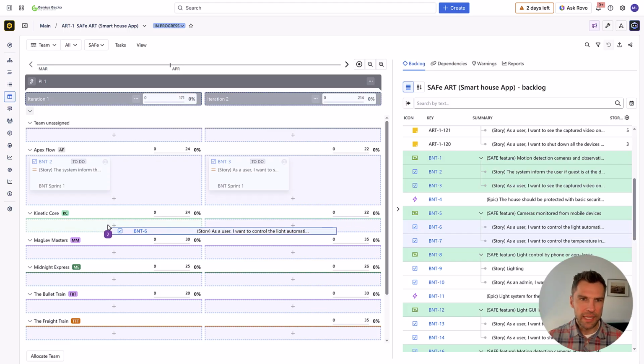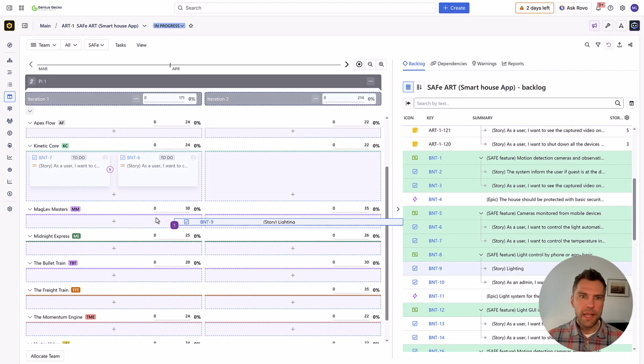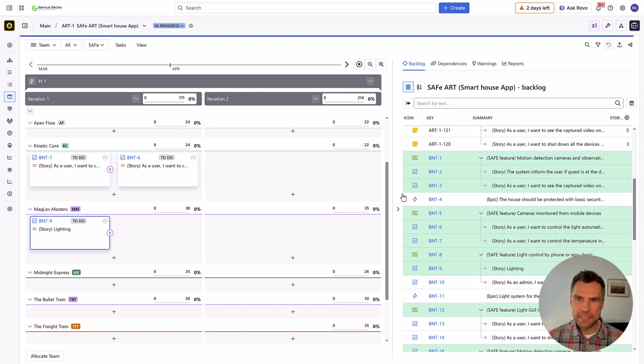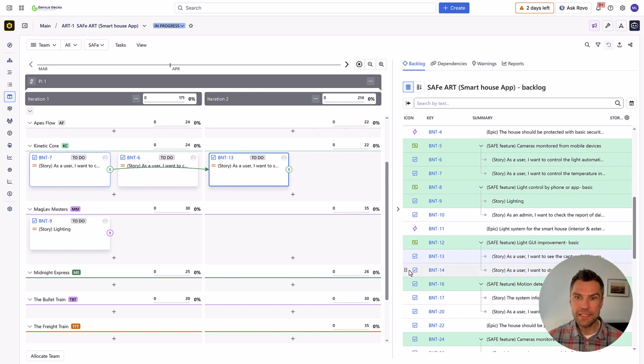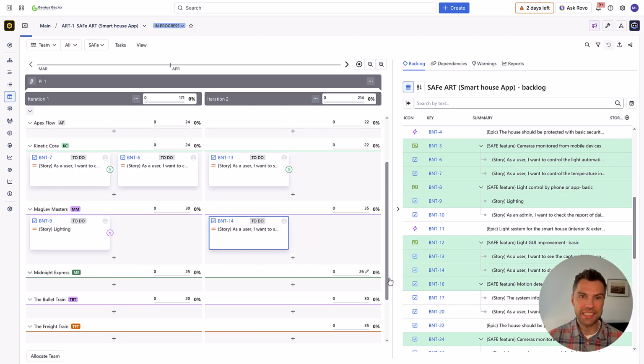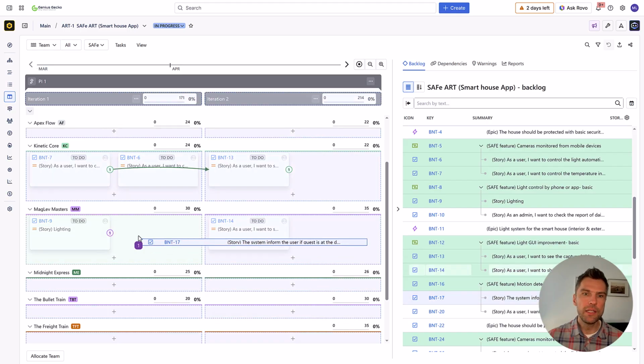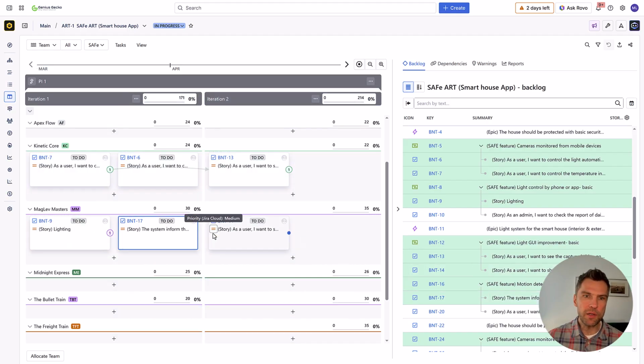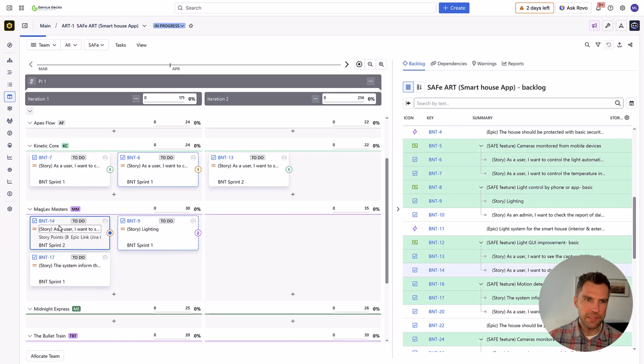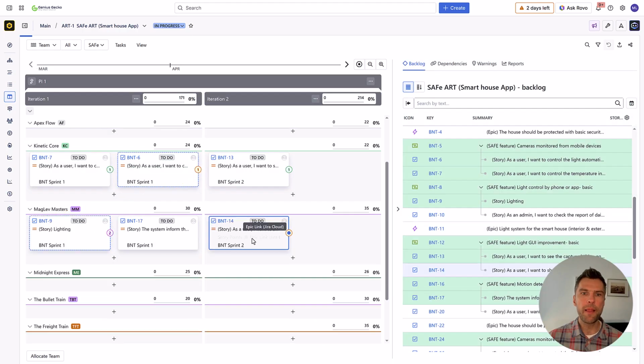I can multi-select work items here, and once I start assigning work, you'll notice that dependencies appear just as I've shown you earlier. So in that case, we will also be required to resolve the incorrect dependencies. So I will need to reverse these two tasks to resolve the conflict. When I do that, I will also need to pay attention to the capacity of the teams.